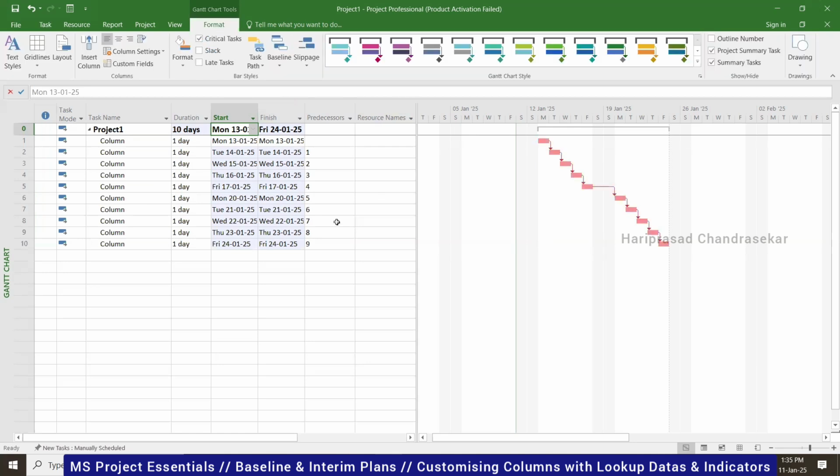Now since everything is one after another, each day one column will be completed. So that's correct. Everything will be critical. You should not delay any one of the activities. So each column should complete on its particular day.